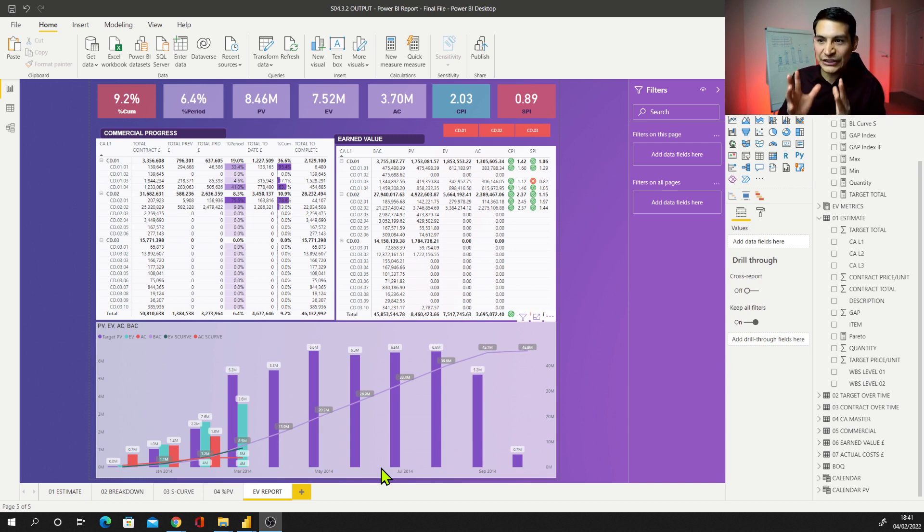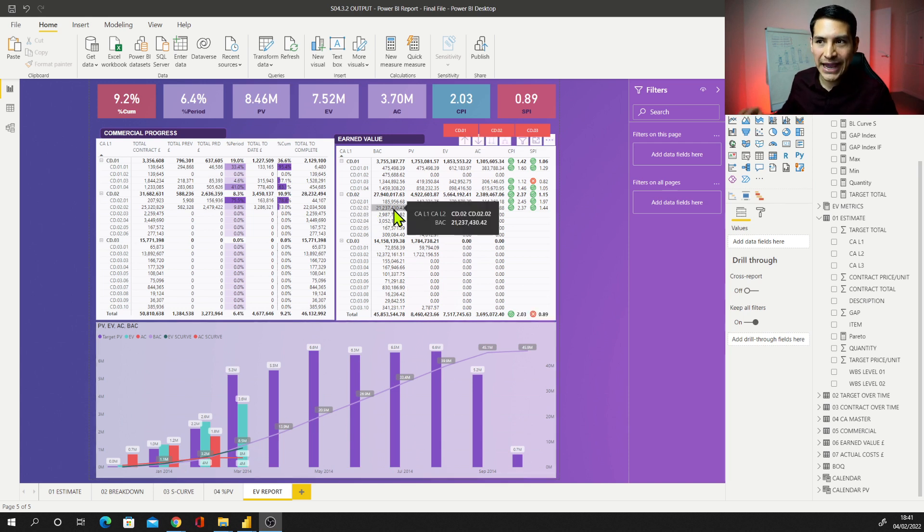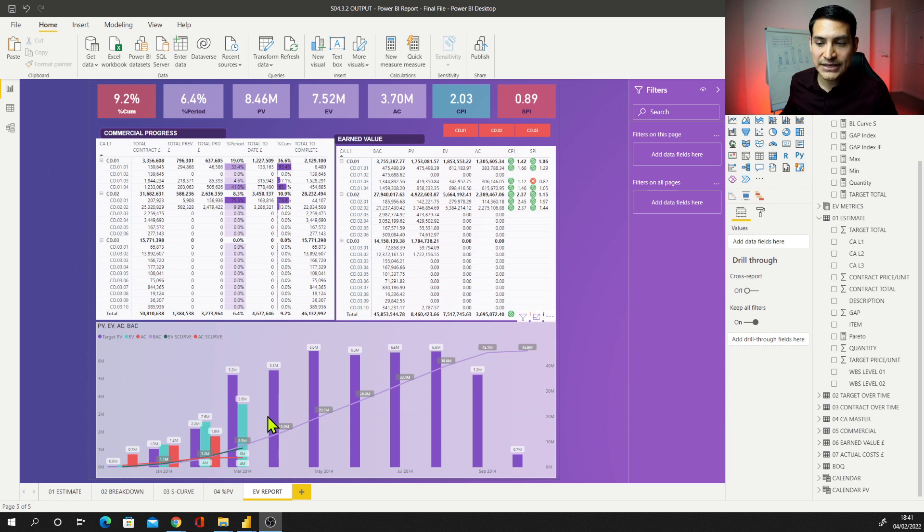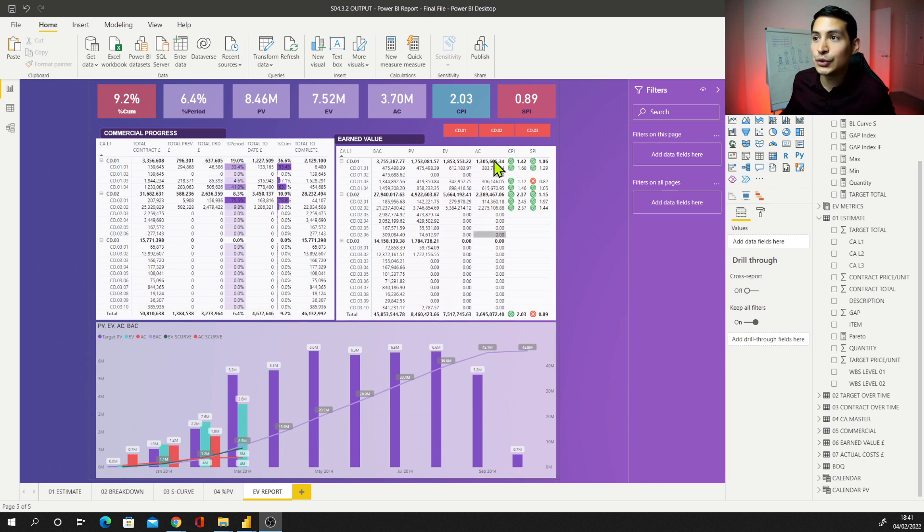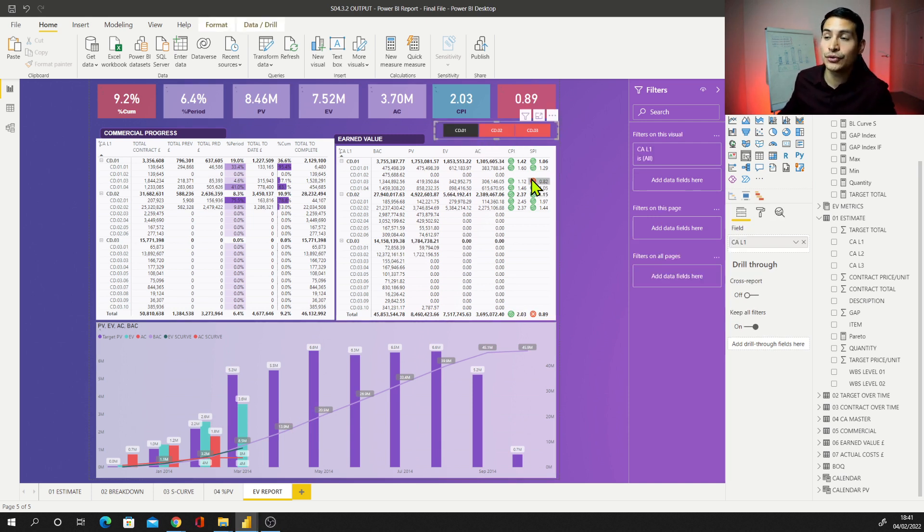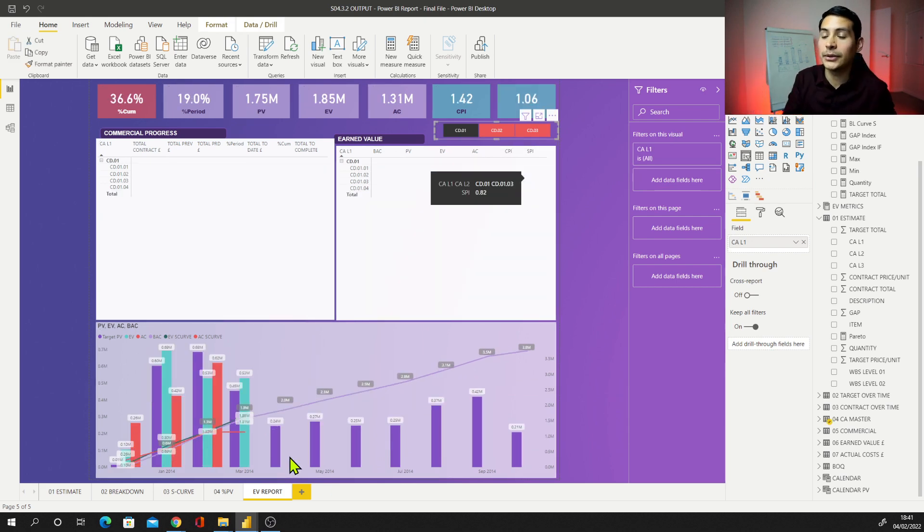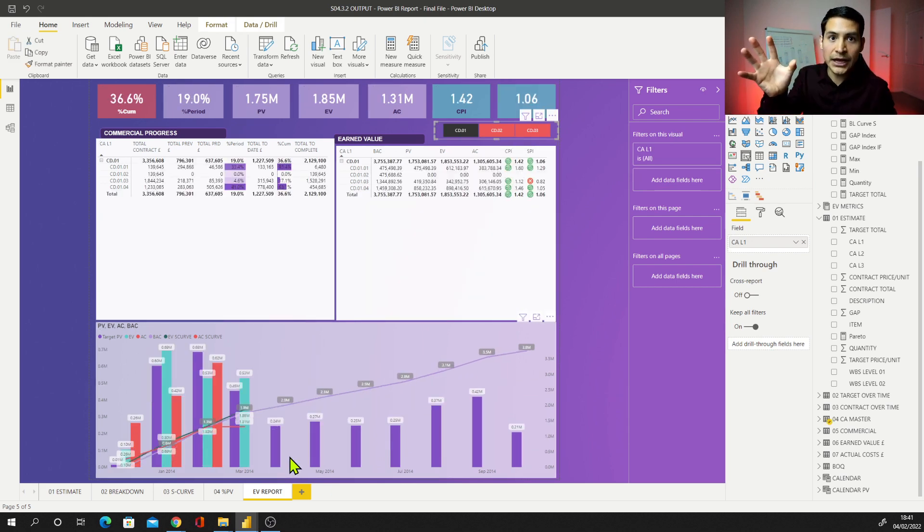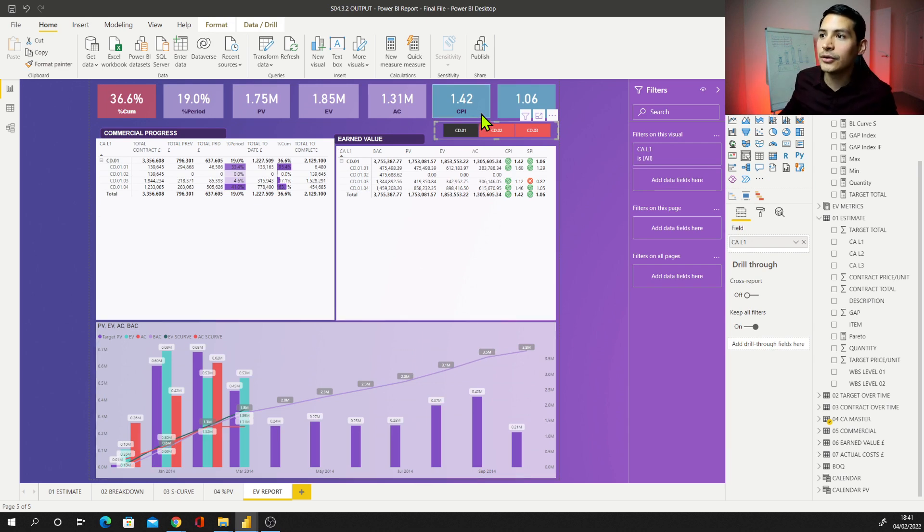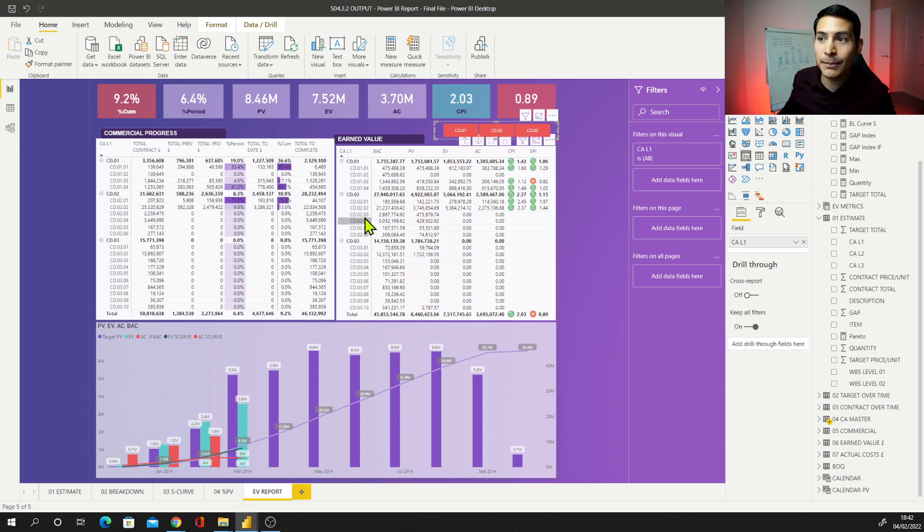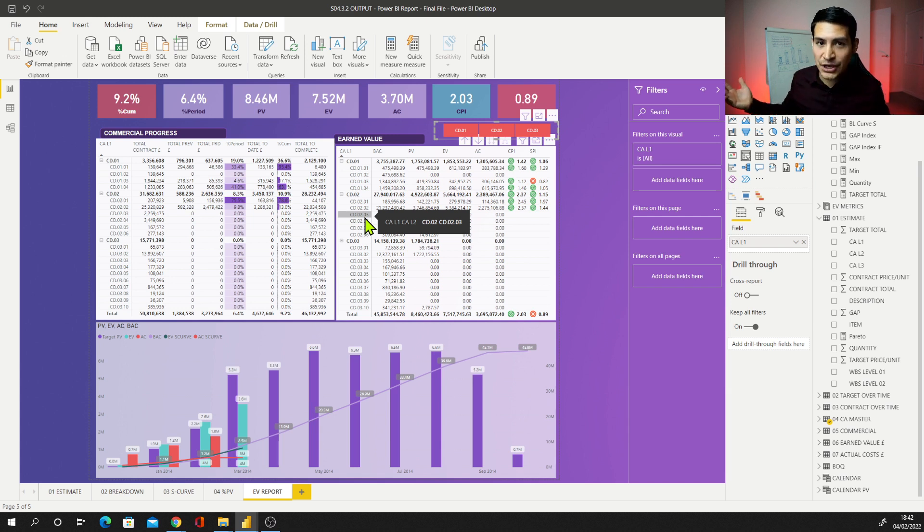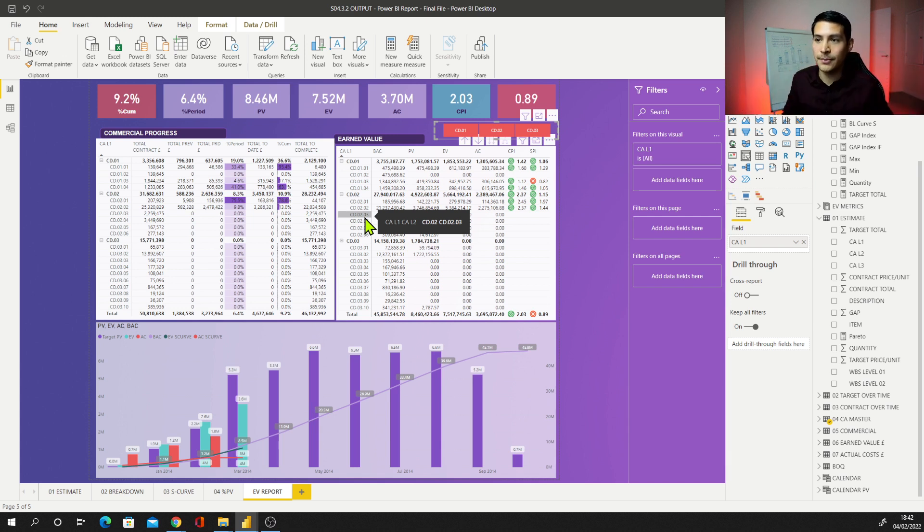So the objective here is I want to depict an S-curve for every single row I have in my table. This S-curve is showing the overall project performance, and you can filter that down using your slicer. But what if I unselect this and I want to show individual S-curve by each control account? If I want to put that on the report, it will be thousands of pages because I would need to create one S-curve for each of them and that is not efficient. So we want to be efficient, we want to provide more insights to our audience, and let's figure this out using tooltips.